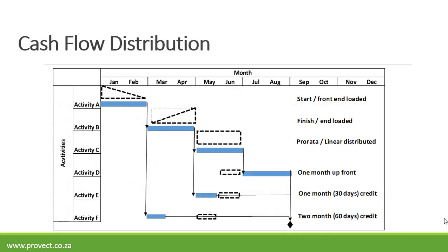With regard to cash flow distribution, on this slide we have Activity A to Activity F. Activity A represents your start or front-end loaded activity. Activity B represents your finish or end-loaded activity where payment is made towards the end of the activity. Activity C is pro rata or linear distribution — equal payments are made monthly. Activity D represents a one month upfront payment, so if the activity starts in July, you need to pay in June.